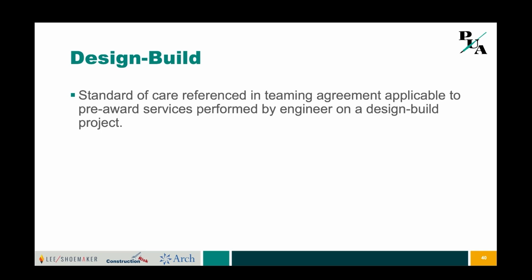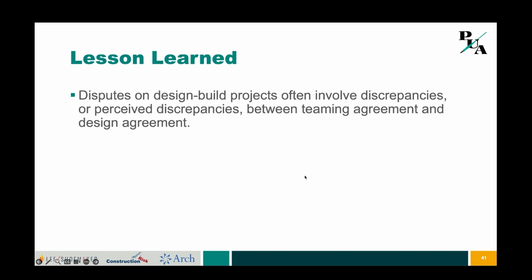Six days before trial, no more time to plan after the six days, the ruling comes down. And the motion in limine filed by the engineer was denied. The court found that the teaming agreement and the project services agreement referenced distinct services, and that the order of precedence and integration clauses in those contracts applied only where there was a conflict between the two, and there was no scope of work under the project services agreement to provide bid phase services, so the jury could hear all of the evidence related to the standard of care provision with that language that their services would be adequate and sufficient for bidding the construction of the project. The lesson to be learned is that you really want to be harmonizing your teaming agreement and design agreement.